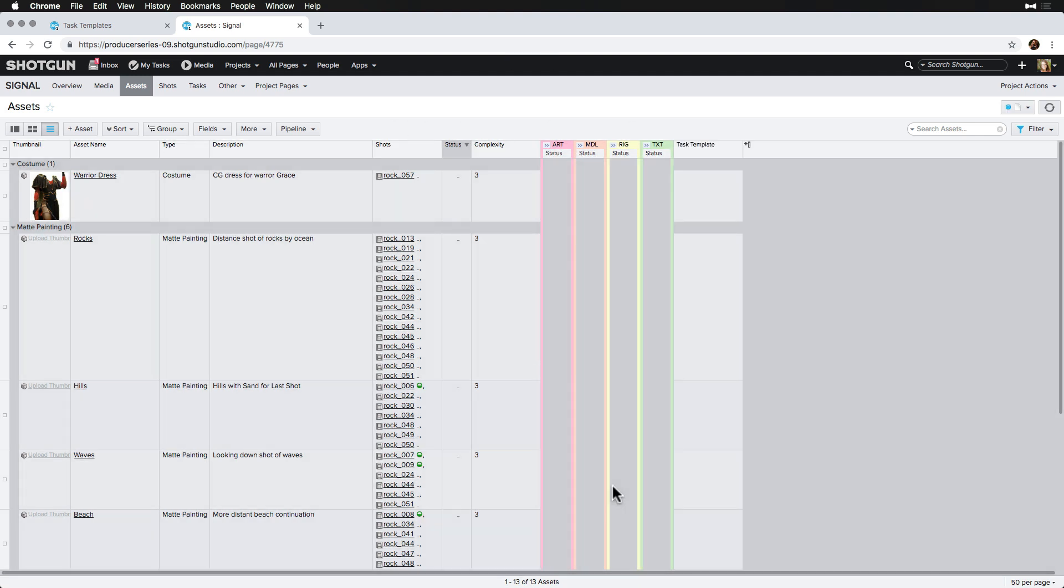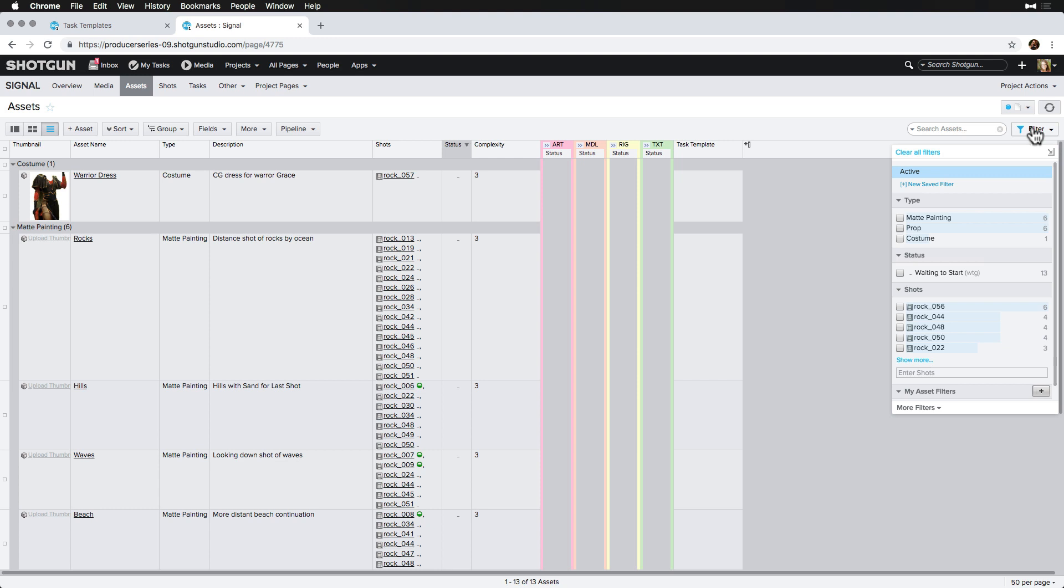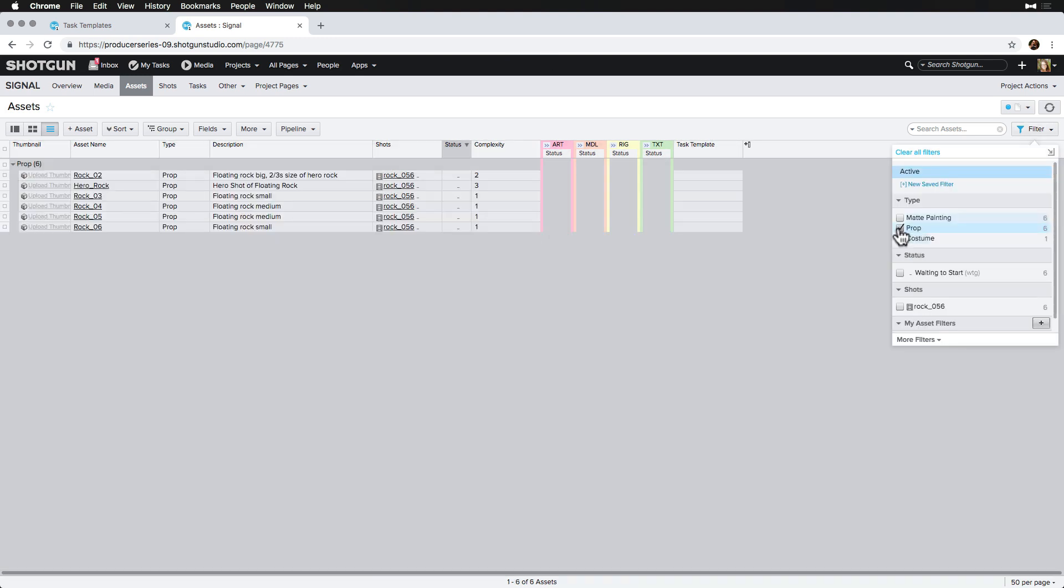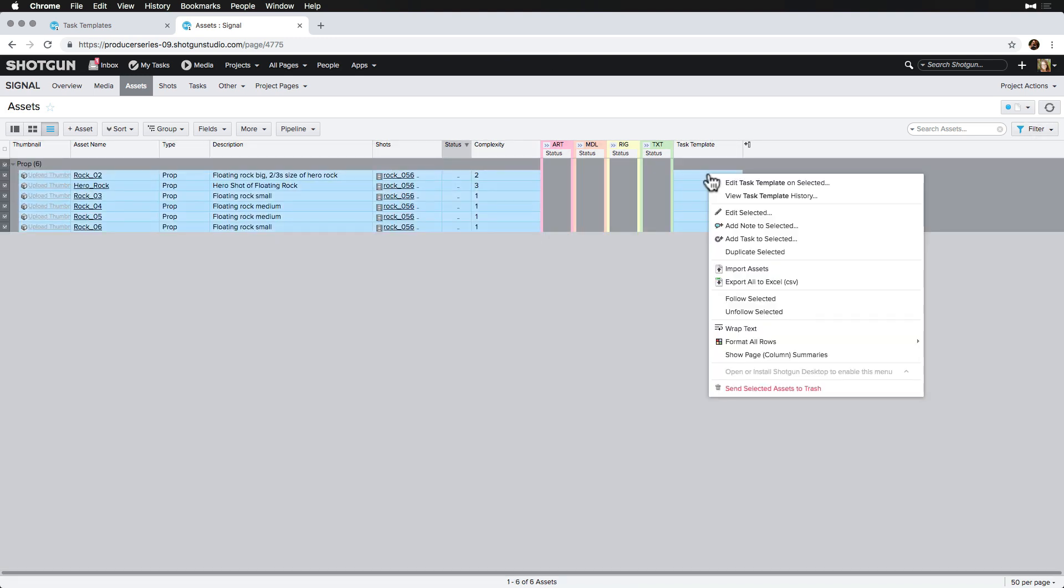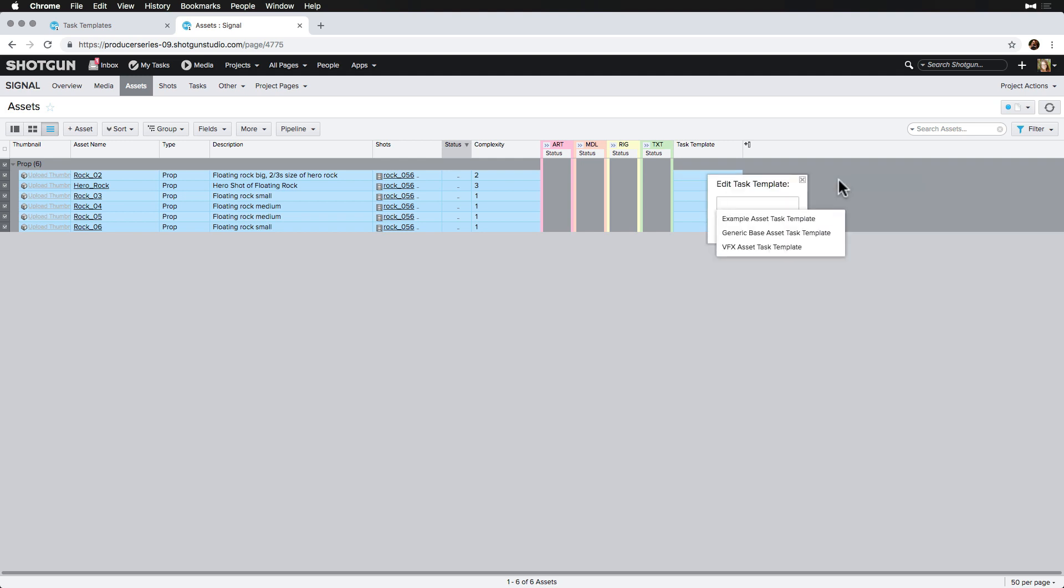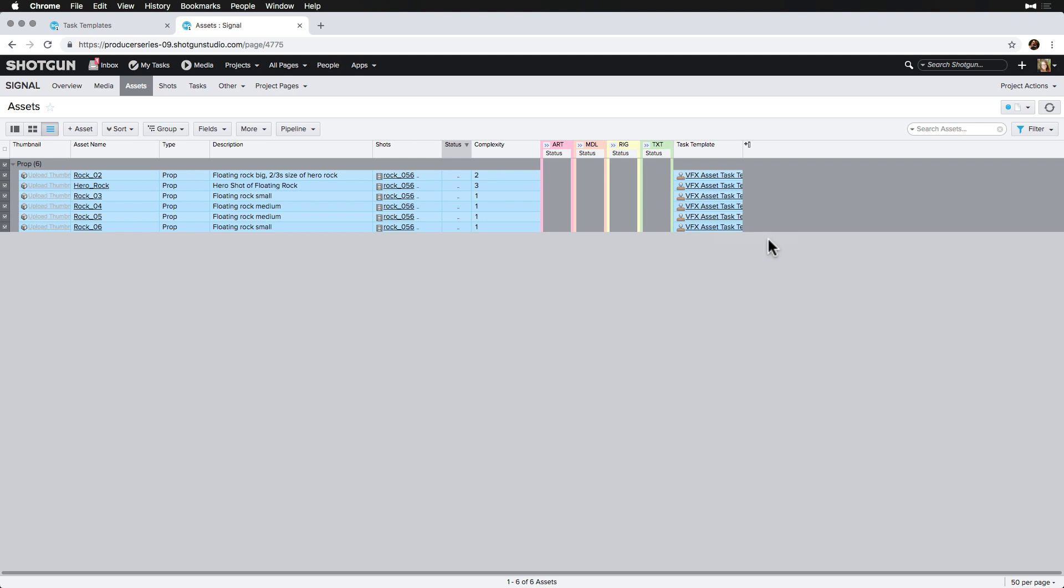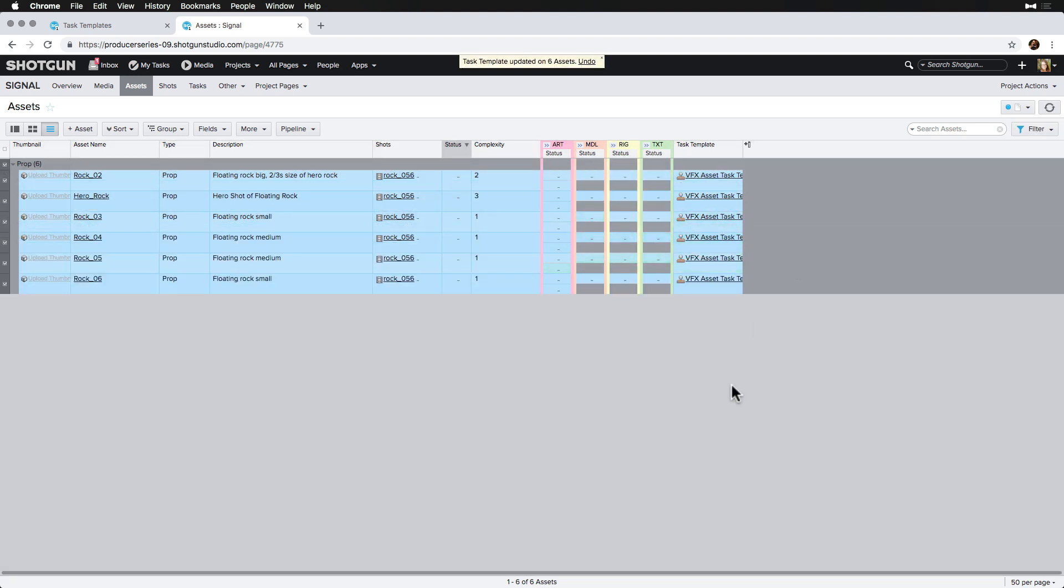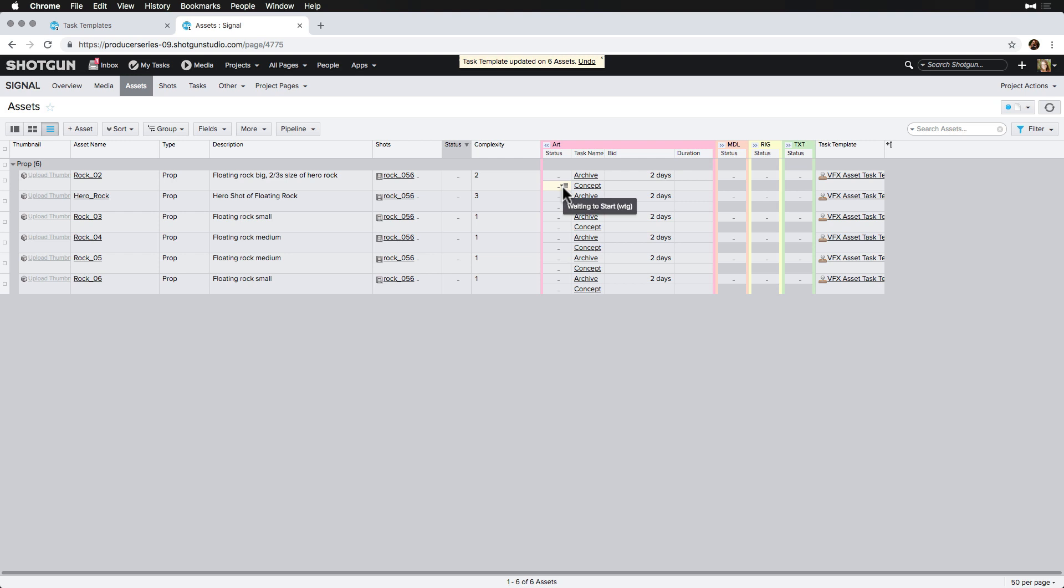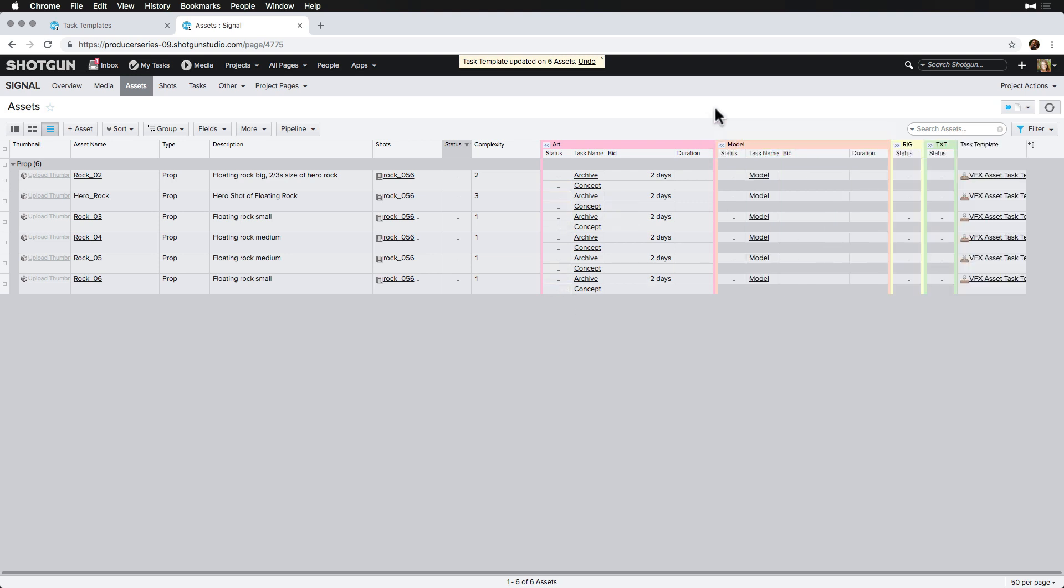Next, we'll select all of the props listed under the prop grouping, right click on the task template column, and select edit task template unselected. And we'll select the VFX asset task template from the dropdown and save. Now, when we refresh, all of the tasks will exist just as we made them in the task template.